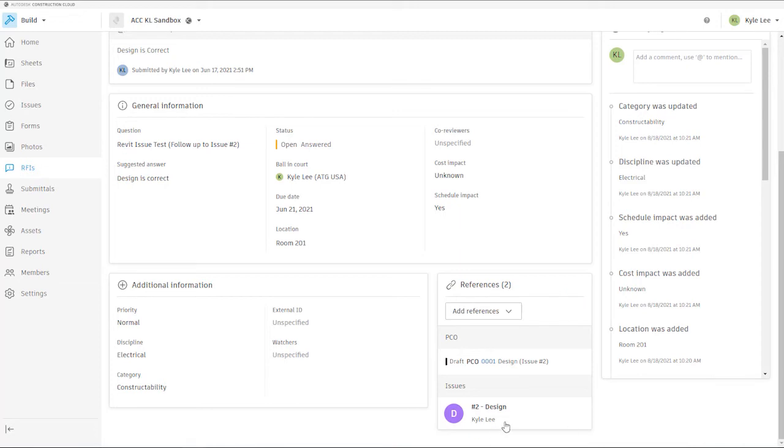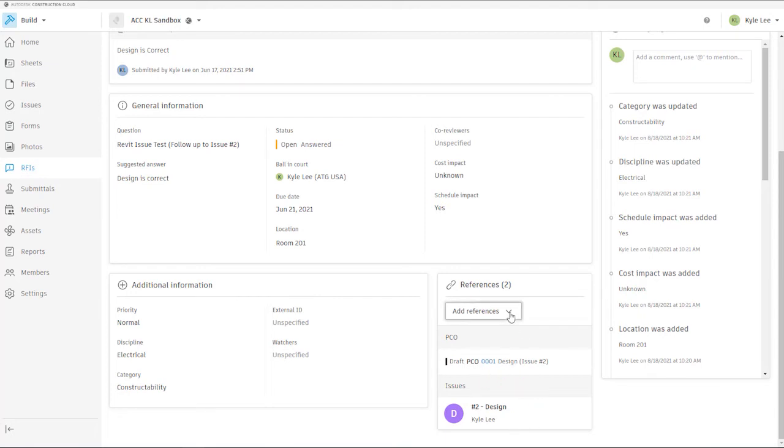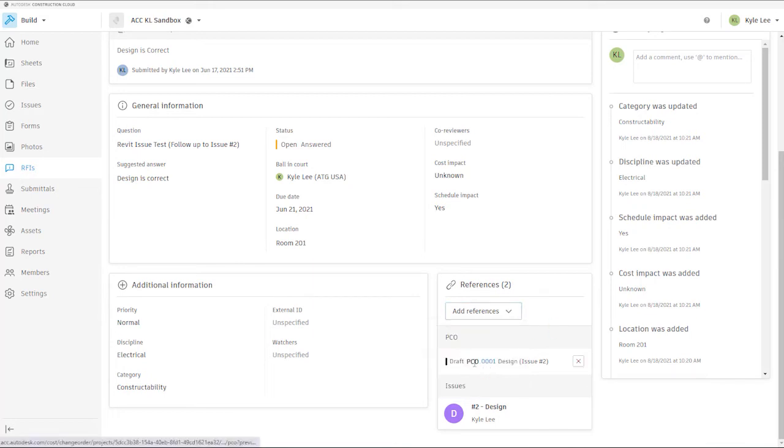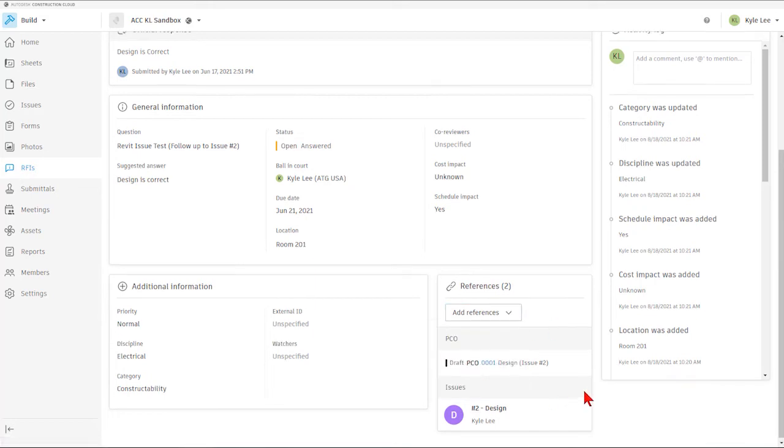So as you can see here, this particular RFI was created from an issue that we already had. So again, we were able to reference from the issue to the RFI. It created this RFI that we're working on now. And you can see that this RFI has also been referenced into a PCO that is available in the cost module for us.